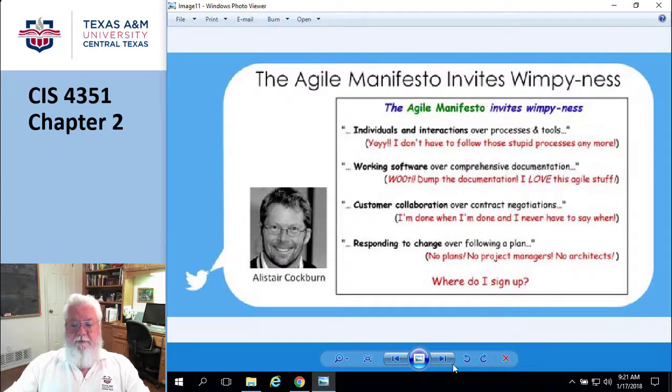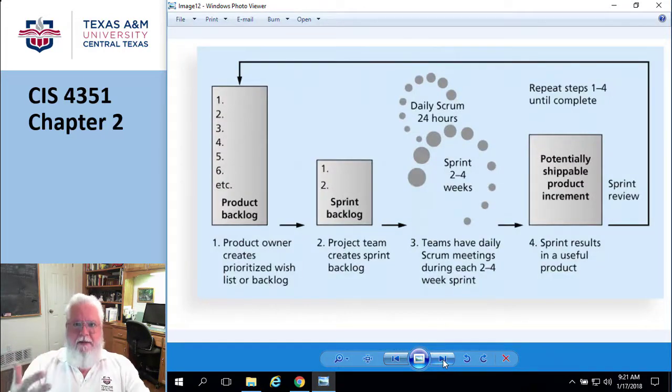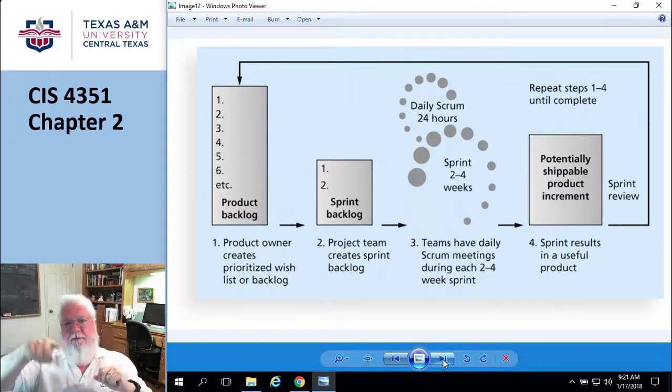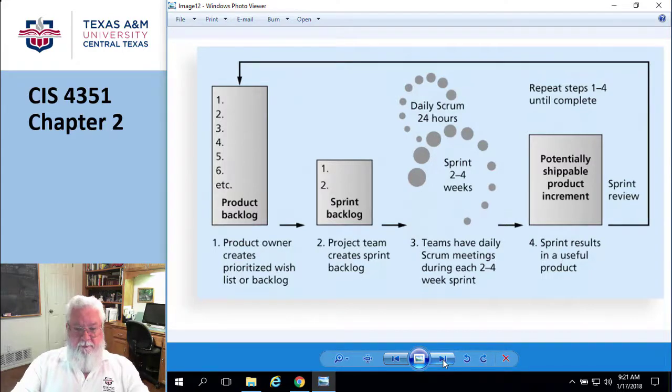The next thing to talk about is Scrum. It's an Agile-like scenario, and the idea is somebody makes a backlog of all the work that needs to be done. You figure out how much you're going to do, and then you work in little sprints of a couple weeks at a time to chew off just that one little piece. And when you're done with that sprint, you actually have a finished part. Now maybe you're not complete, but you've got that one potentially complete part, and then you do it over and over again. So it's just another technique. It's an Agile technique that basically works in sprints.